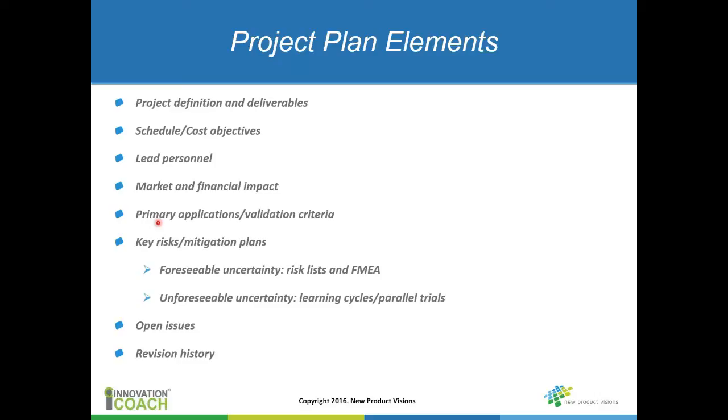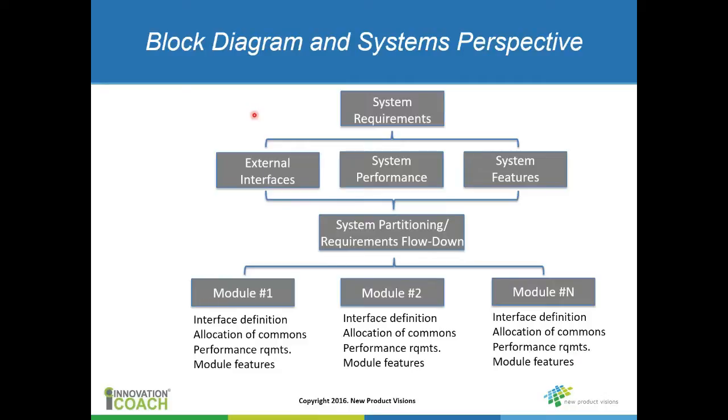So let's talk about a couple things here. Within the context of the project definition, one activity that will happen, and this will drive a lot of the tasks associated with building that first prototype, will be the concept of developing a block diagram or looking at your product as a system. So system architecture is very important, and I mentioned that in previous webinars. That's an activity that's got to get done in the context of describing the product and thinking about how you're going to engineer it and how you're going to develop that first prototype.